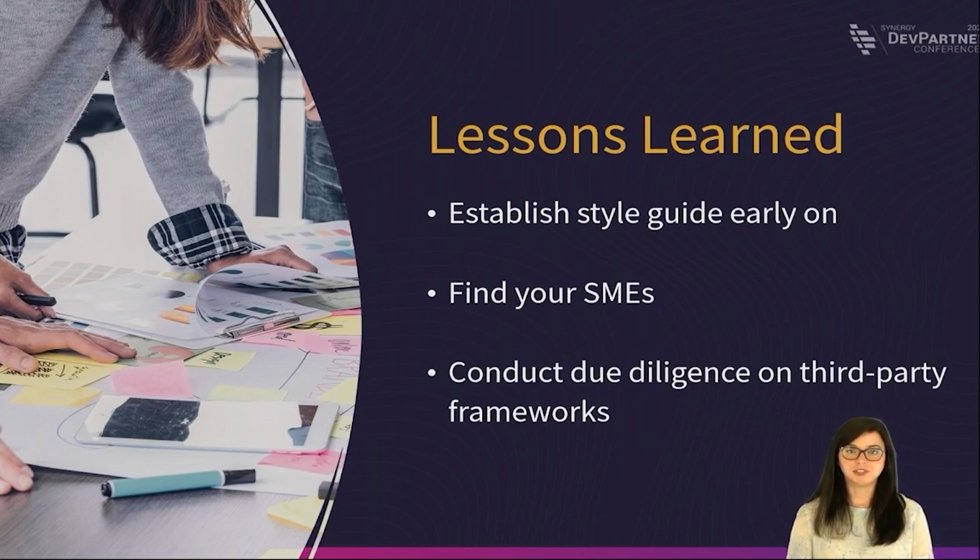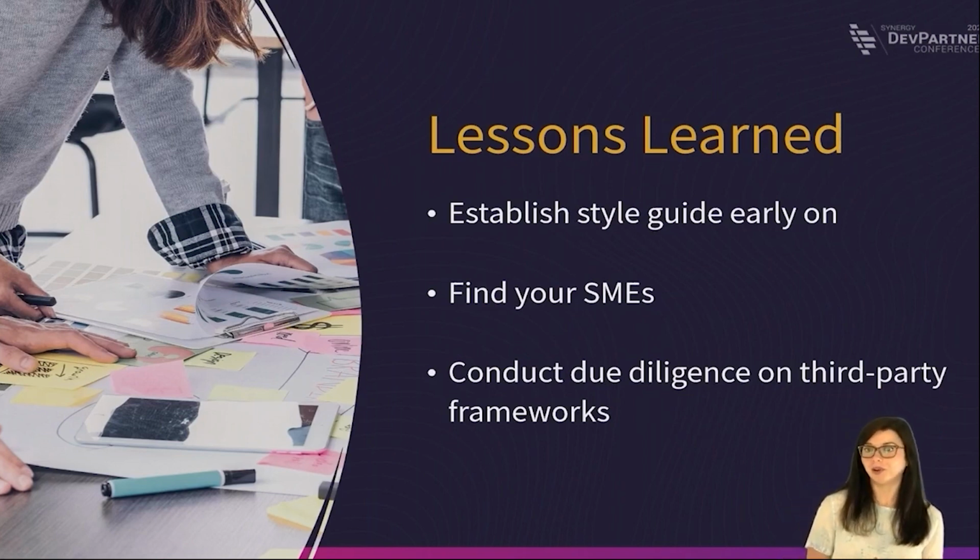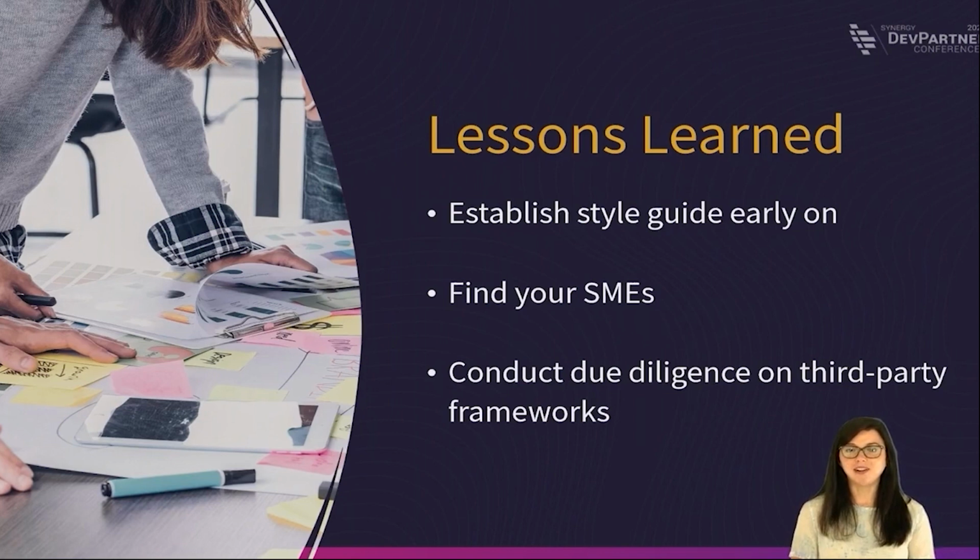During and after Forward's proof of concept last year, the team spent a lot of time working together to make sure there was an established style guide, including things like color and sizing and fonts for the new screens. By making this time investment up front, the team saved time in the long run, as they did not need to go back and reskin screens after the fact. It's also a good idea to bring in someone with a good aesthetic eye into this process, which is not necessarily always the programmers on the project. This focus has paid off big time during their customer demos, as the app looks slick and not like programmer art.